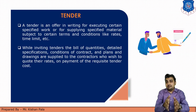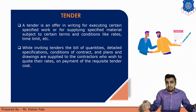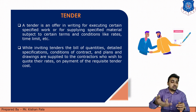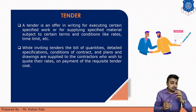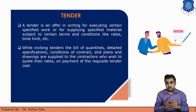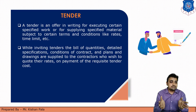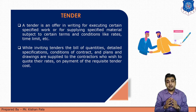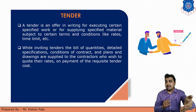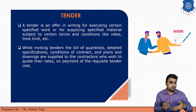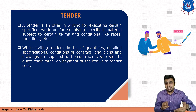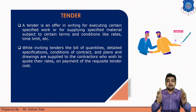For example, the work should be done within three or four years — that should be mentioned in the offer. There is also mentioned the total amount of the project. While inviting tenders, the Bill of Quantities is provided, which mentions the total quantity of all the activities of that work, along with details, specifications, conditions of the contract, and plans and drawings supplied to the contractor who wishes to quote their rates upon payment of the requisite tender cost. So the client offering a tender must mention terms and conditions, bill of quantities, plans, specifications, and other required documents for that work.